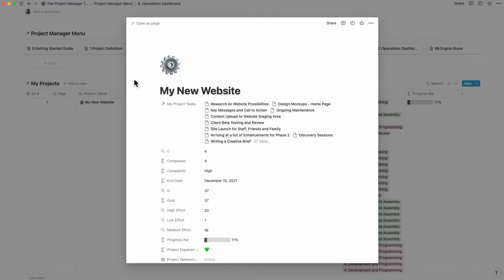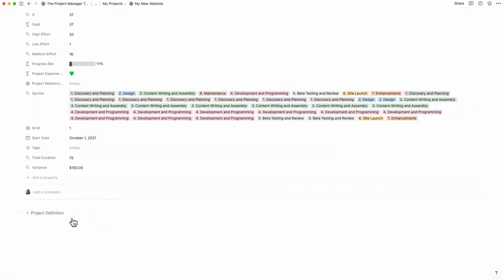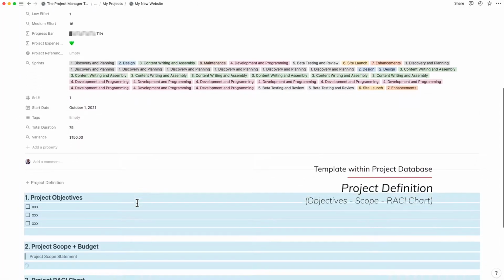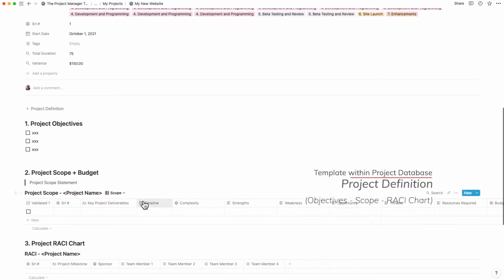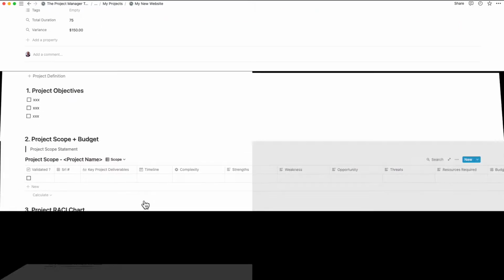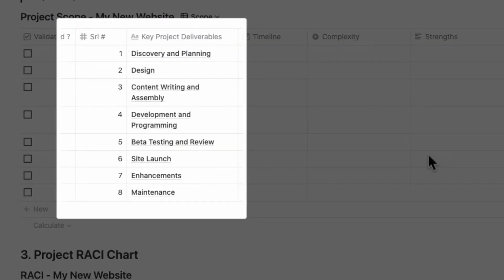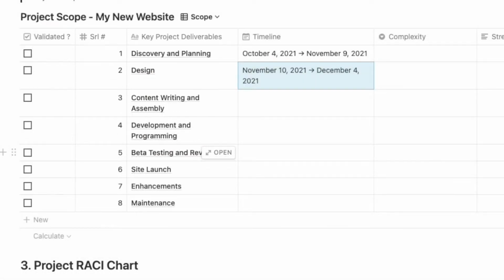A strong project plan is one of the most critical stages in the whole process. I have incorporated all of this into a template that I can draw upon while executing the project. Every important achievement in a project is a milestone, and every milestone needs to have a start date for activities and an end date when the milestone will be achieved.